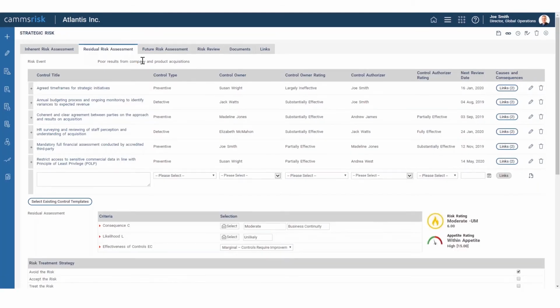As I move through the workflow into the residual risk assessment, this is really where you get into the broader mitigation strategies. So you've identified your risk, you've got it in your registers now, you understand the risk as it stands. What you're now looking to do is build out a mitigation framework, which involves a number of things, but primarily looking at the establishment of a number of controls and assigning those controls out to a range of different control owners within the organisation. So that ability to disseminate responsibility across the board is also quite important, to involve everyone in the risk management process.